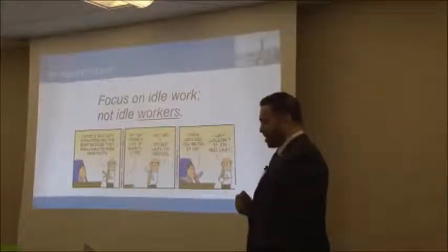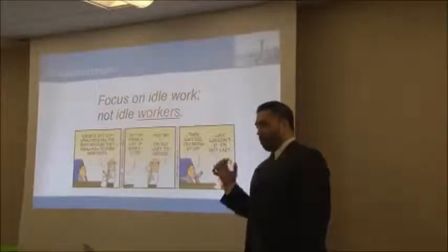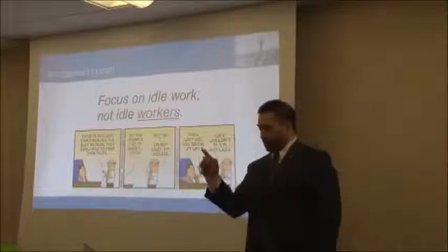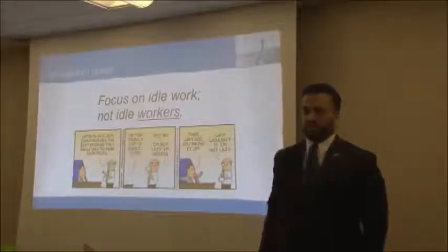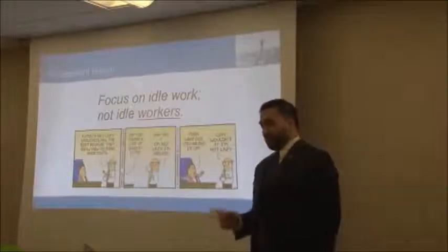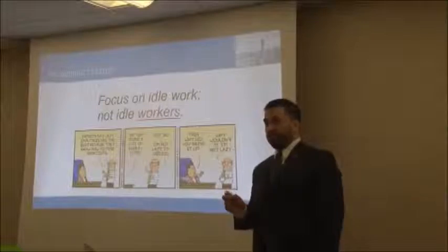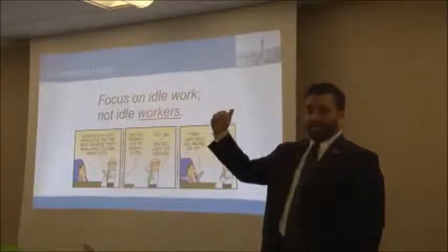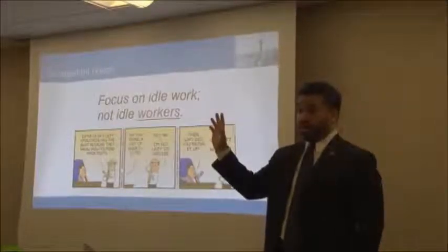And that's not really the right way to look at it, because a command and control manager will come in and say, I want 100% utilization of everyone. So Bobby, go grab the next item on the backlog and start working on it. Make yourself useful. The problem is, when you do that, you've now increased work in process, which we talked about was bad. You've now increased your cycle time because there's probably a tester or two somewhere who are plenty busy.